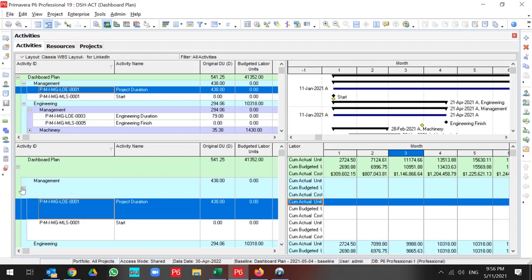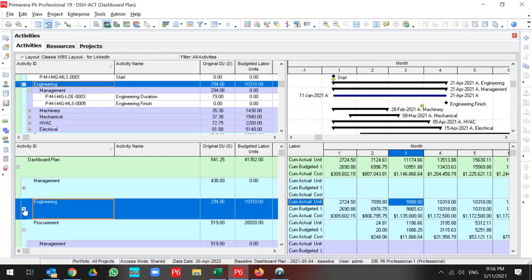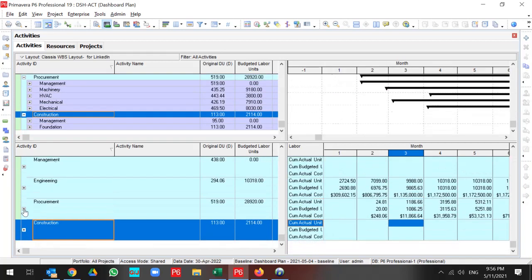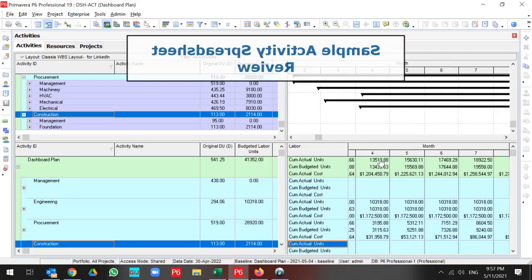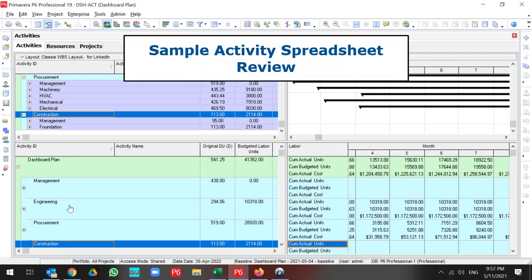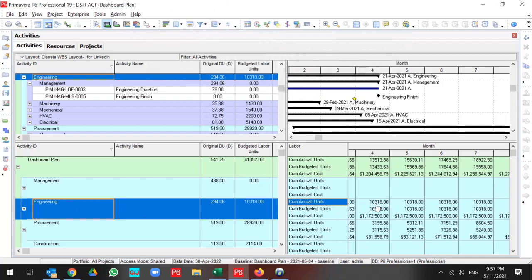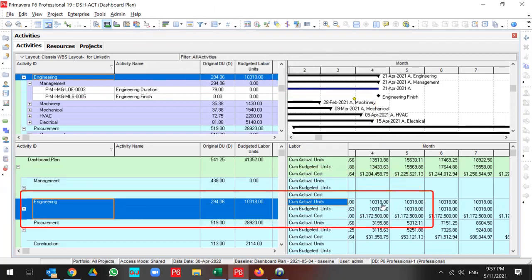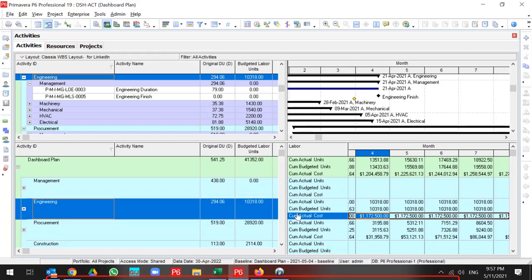Also, you can select your proper WBS and find out what happened to your project based on distribution. At month 4, for Engineering Phase, I need 10,380 labor units, and I did Actual for all of them. And this is my Cumulative Cost for Actual Unit.